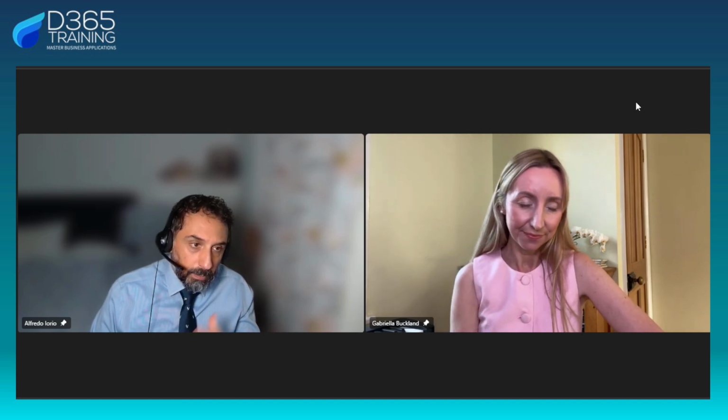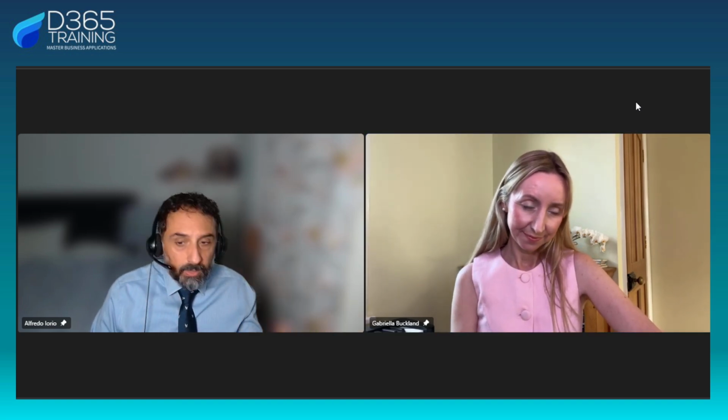Strategy means I work with your client, I work with the project sponsors. Who should attend the training? Strategy is based on decisions. What's the ideal format? How often? It's still going to be a compromise because, as I said, you cannot possibly accommodate for everything. Otherwise, it's going to be incredibly expensive. But you plan that ahead and you fit the training strategy into the delivery strategy.